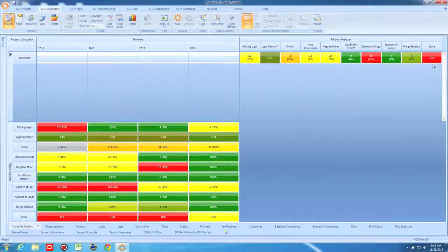It's important that I make sure that the things that I'm doing to improve quality at the lowest level are actually helping me improve my quality at the portfolio level. Otherwise, there's a chance that I'm wasting my time. So as I work with this and as we drill down and roll up, we want to make sure that we're seeing improvement here. If we're not, it means we're making quality improvements that are actually at the expense of other areas in the schedule.